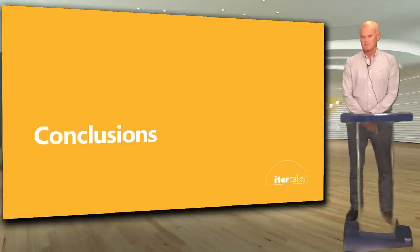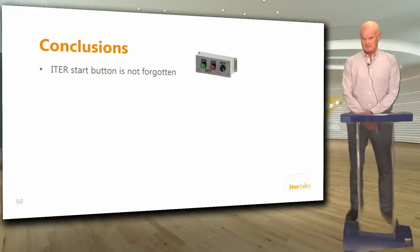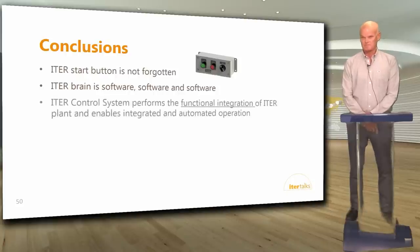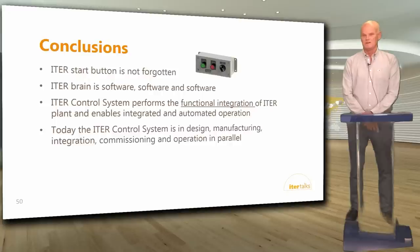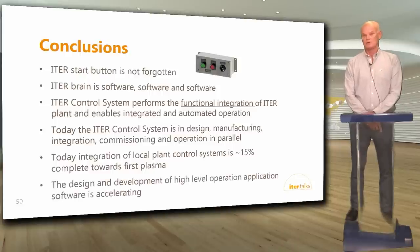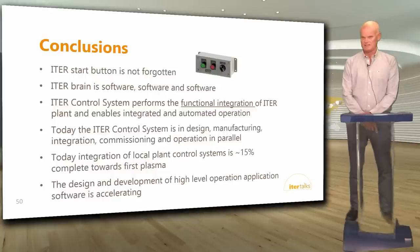Time to wrap up. First conclusion: we have not forgotten the ITER start button. Second: the ITER brain is software, software and software. Third: the ITER control system performs the functional integration of the ITER plant and enables integrated and automated operation. Today the ITER control system is in design, manufacturing, integration, commissioning and operation in parallel — all life phases simultaneously. Integration of the local plant control system is 15% complete towards first plasma, and the work to design and develop high-level operation application software is accelerating.